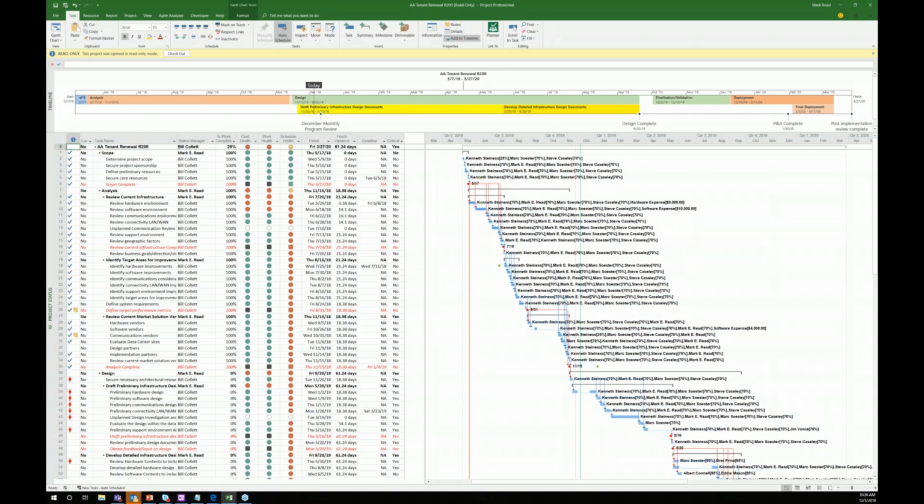So it doesn't really matter what the size of the task is, but if you're below 10% over your variance, this KPI will be green. If you're between 10 and 20%, then it'll go yellow. And then if you're over 20%, you'll go red. And think of it as an early warning system to be able to detect what's going on in your schedule.